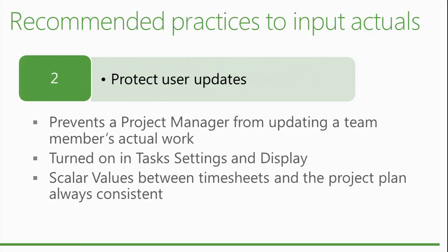It should keep basically the way the data was entered by the user, and it should flow through the system. But it's true that if you enter 32 for a week, and it's time phased by day, for example, Project Server is going to split it and spread the actuals. And sometimes, because you have calendars that have different rules, it may vary a little bit the way it distributes the hours per day.